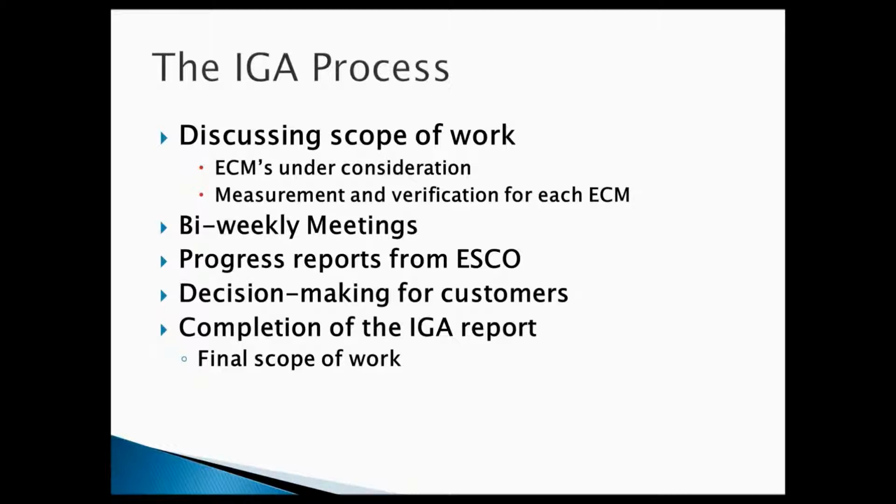Now, the process itself, the length of the procedure really depends on the complexity of the project. An audit could range from 4 weeks to possibly as long as 6 weeks. Again, this is where the details of the project are more fully developed, and an analysis is done under each ECM under consideration, and the measurement and verification done for each ECM.